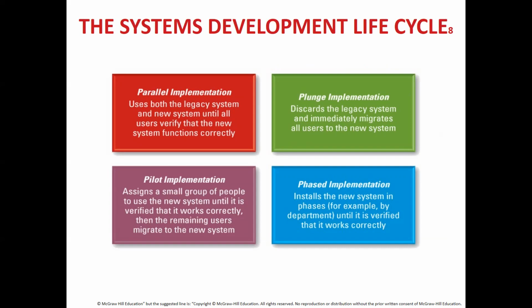Plunge implementation. Plunge means you take a jump. Okay, so what happens is over here you're taking a jump and you are discarding the legacy system, and immediately you migrate all the users into the new system. Now, this might be problematic at times. Why? Because once you actually discard the old system, what if the new system does not meet your demands, does not function properly? There may be a lot of errors that are witnessed after the testing phase. It could be, okay? So plunge, however, discards the old system.